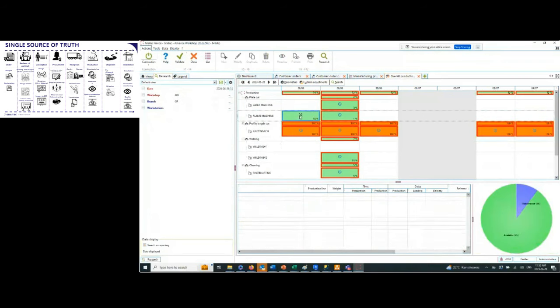One other important note here is that we can actually factor in maintenance of machines as well. You can have your own machine maintenance schedule board and allocate an individual to service the machines bi-weekly or whatever the requirements are for that machine, and you can factor that downtime into this table as well.